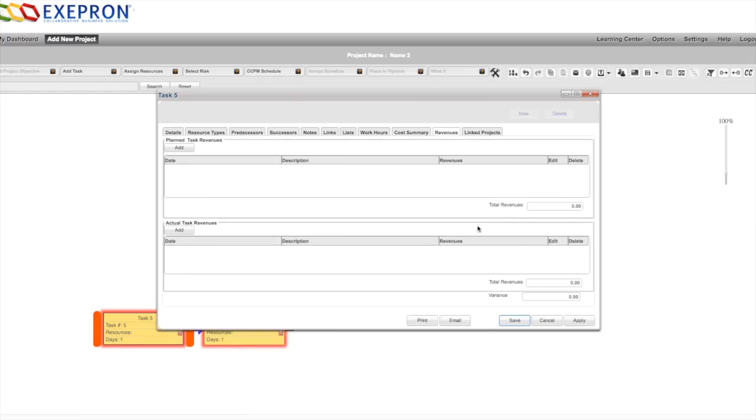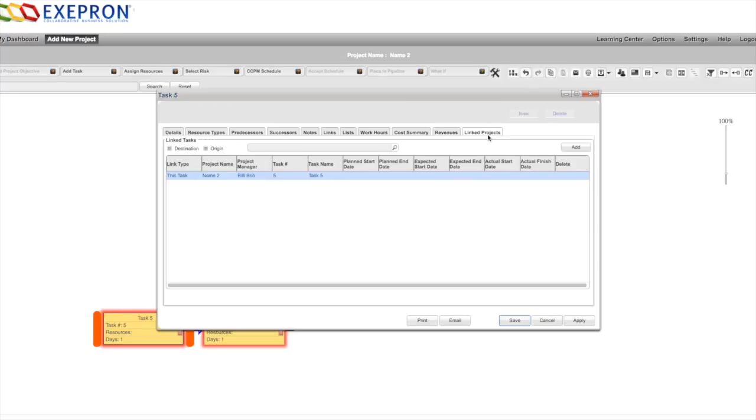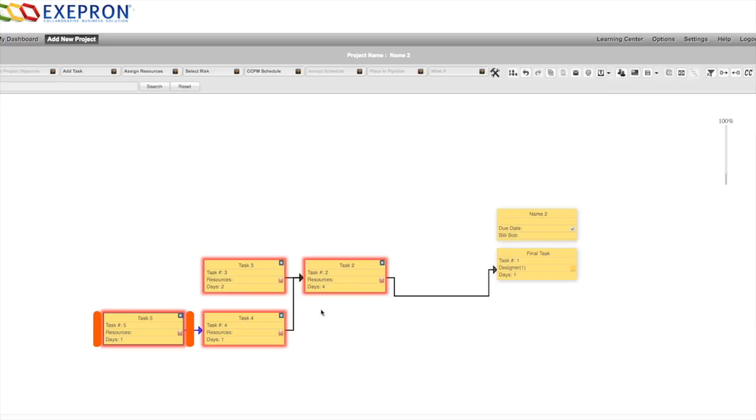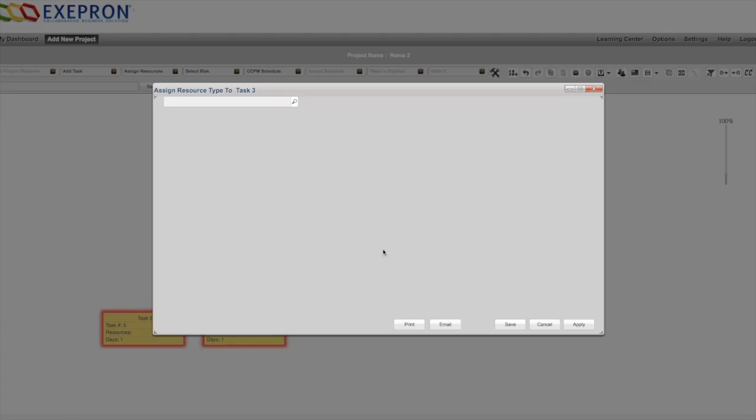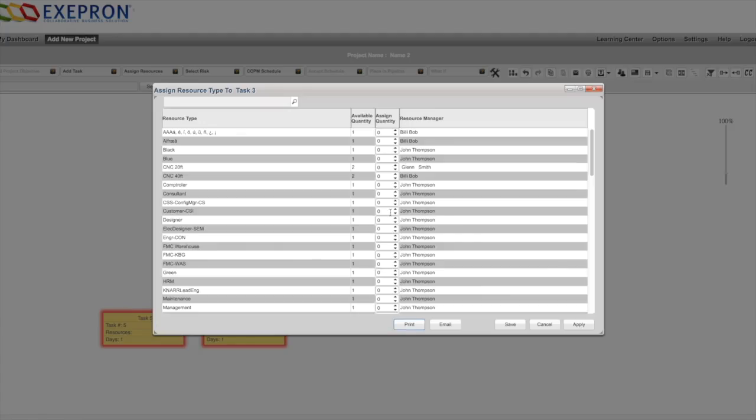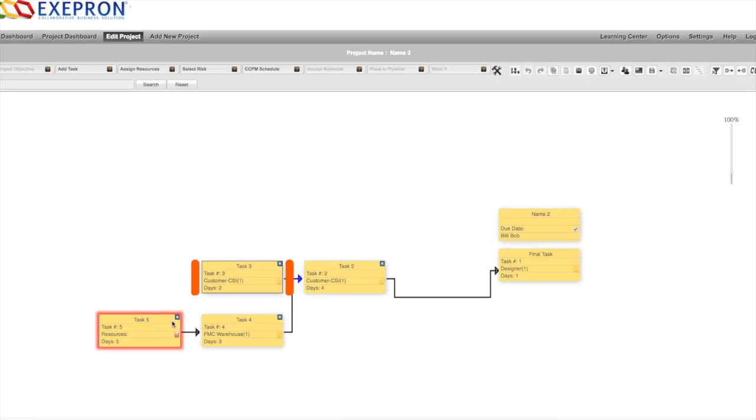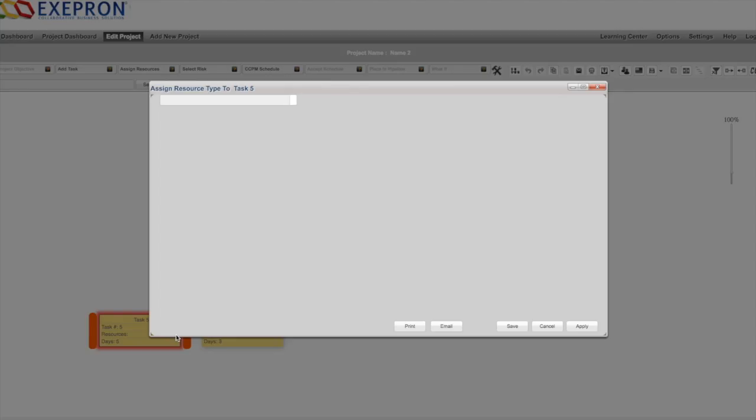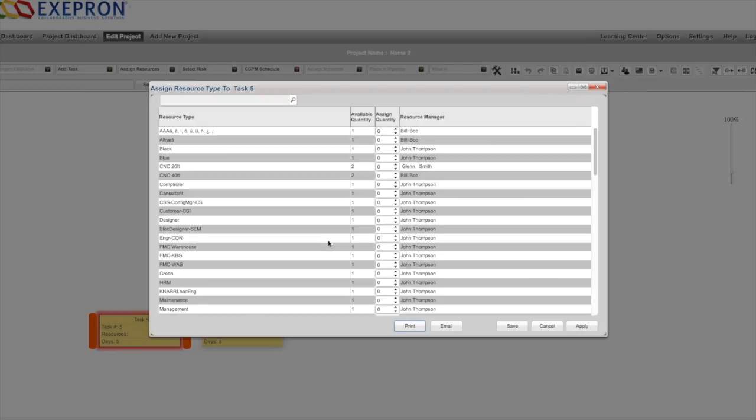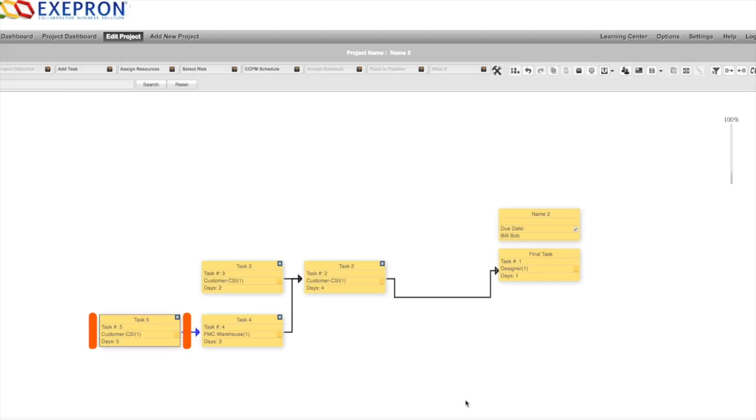You can link projects together by linking tasks on projects together. You can continue by adding the resource types. You see red there is information missing, so the red rim or halo indicates missing information. In this case the resource type. Click add resource type, save. Your project is ready to schedule. Click the CCPM critical chain project management button.